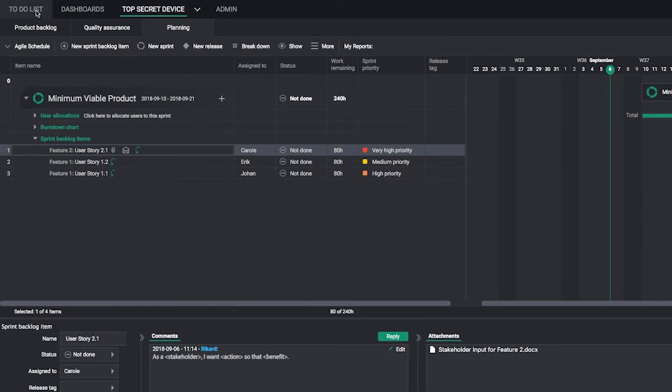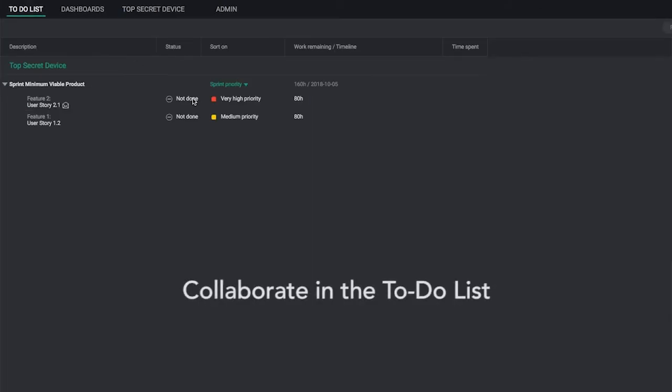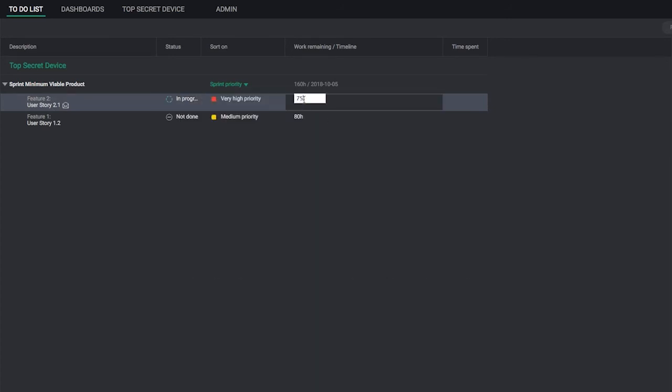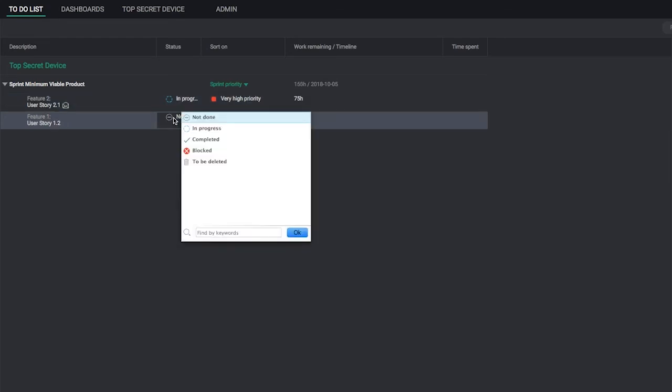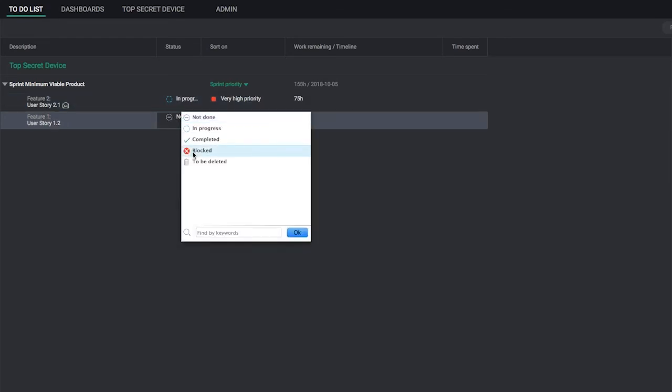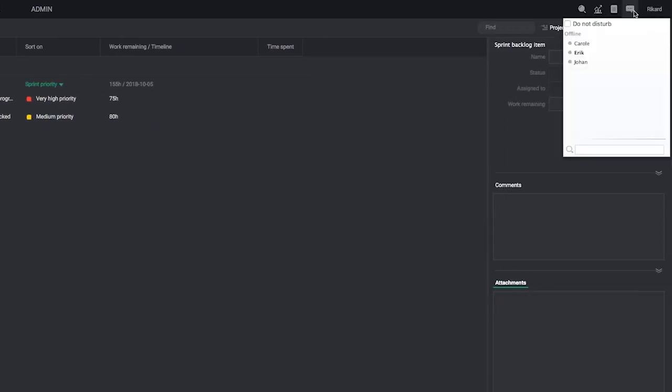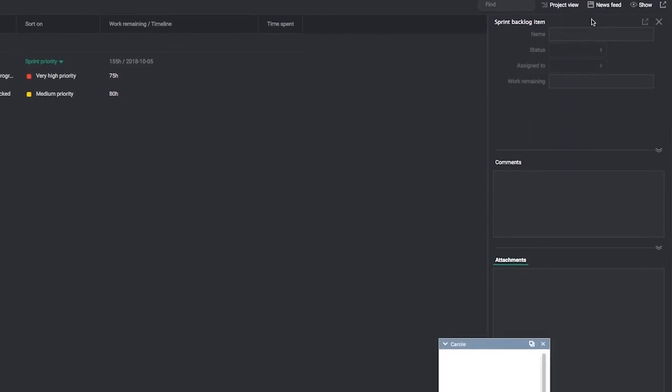The to-do list is where team members collaborate and update progress. Use the to-do list to update work remaining. Change item status to communicate progress or issues, and collaborate using the built-in chat feature.